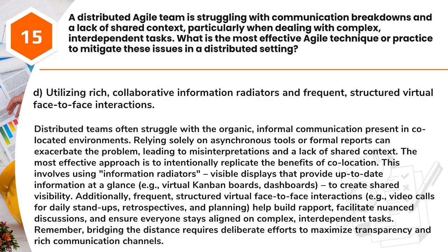Distributed teams often struggle with the organic, informal communication present in co-located environments. Relying solely on asynchronous tools or formal reports can exacerbate the problem, leading to misinterpretations and a lack of shared context. The most effective approach is to intentionally replicate the benefits of co-location. This involves using information radiators, visible displays that provide up-to-date information at a glance, e.g., virtual Kanban boards and dashboards, to